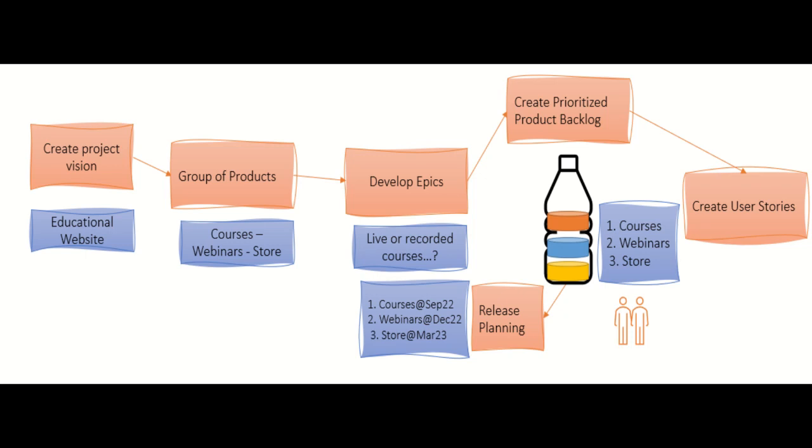So this is a user story. In this user story, you estimate the user story weight: how many tasks it needs, how many persons it needs to create this user story. And then you estimate this effort by some estimation techniques. We can take it later in the advanced course, which is for the Scrum Master.